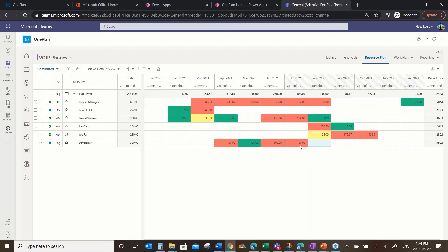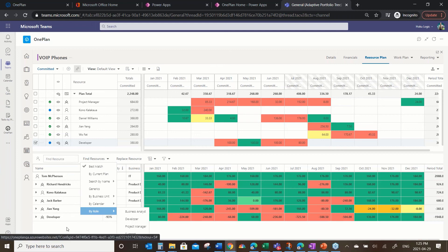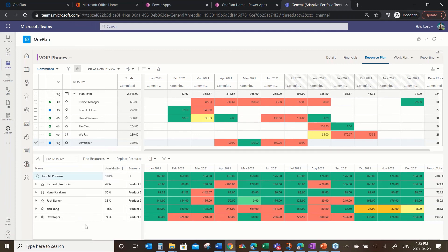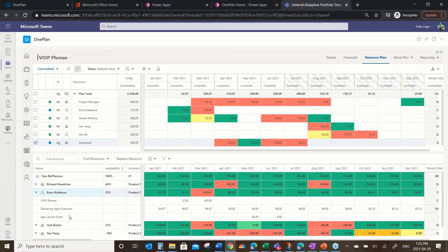In just a grid form, you go in, enter the resources, and if you need to add another resource, you can. If you wanted to look at how we might replace a resource, you can find your best match. Here are all the developers. Tom, who's new to the organization, has 100% availability and might be a great swap to immediately take up that capability. And if I look into Kono, who's already on the project, I can see as a PM what else they're on — Kono's on a couple of other projects, so trying to get him involved in this additional role won't work because of another particular project. As a PM, I have that visibility as well.